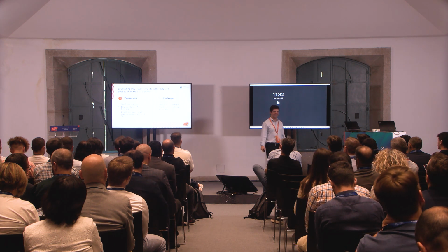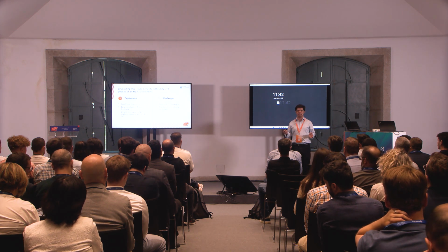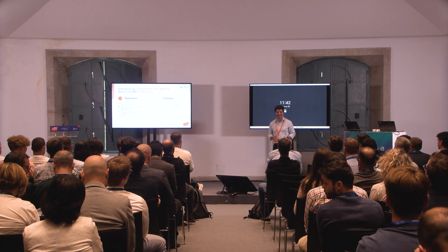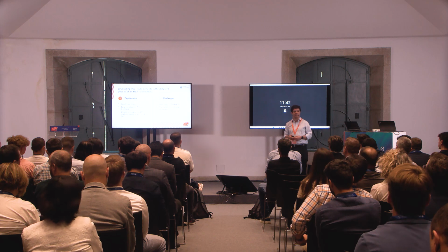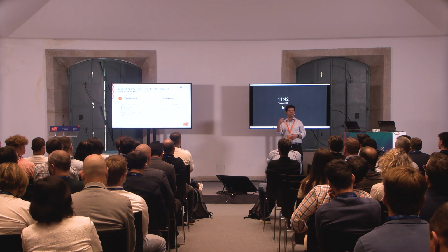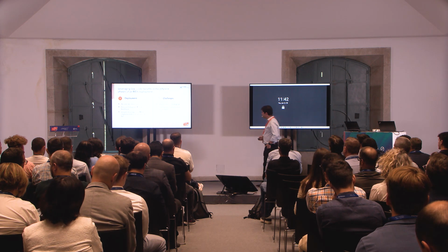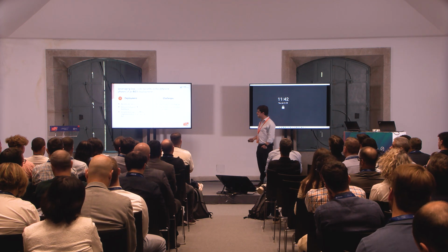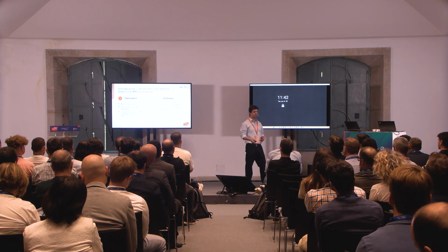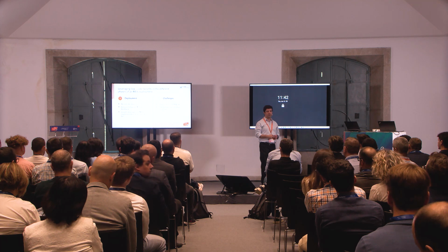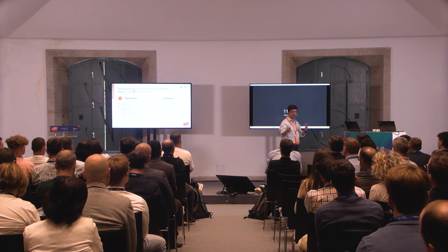I mean, we've all done this, right? We build something quickly, we show this to someone. Yes, it looks good. Well, let's put it in production, right? So we've all done this, and this is dangerous, of course. So this is not an excuse to go over good software engineering practices, at least in this stage. So this is a challenge that needs to be managed, because if you are doing quick prototypes and providing quick deliveries to your customer, they will obviously want to put this in production as quickly as they can, and this still needs to go through testing phases and validation and so on.